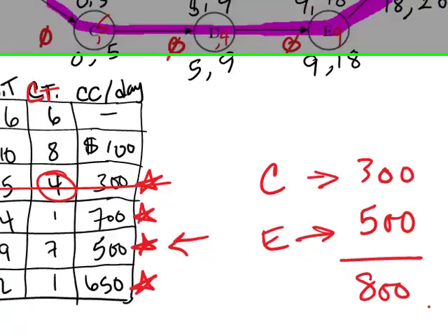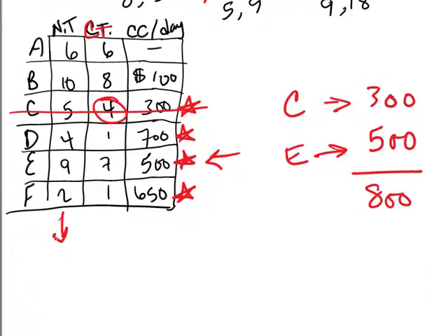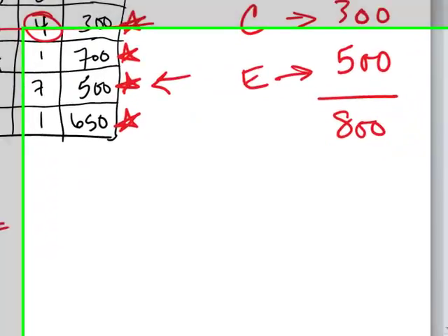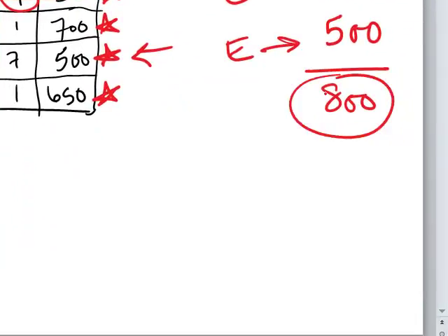Of course, whatever cost there is involved in getting the project done in normal times will remain intact. But the 800 is the additional cost of crashing the project beyond its normal time, from 20 days to 18 days.